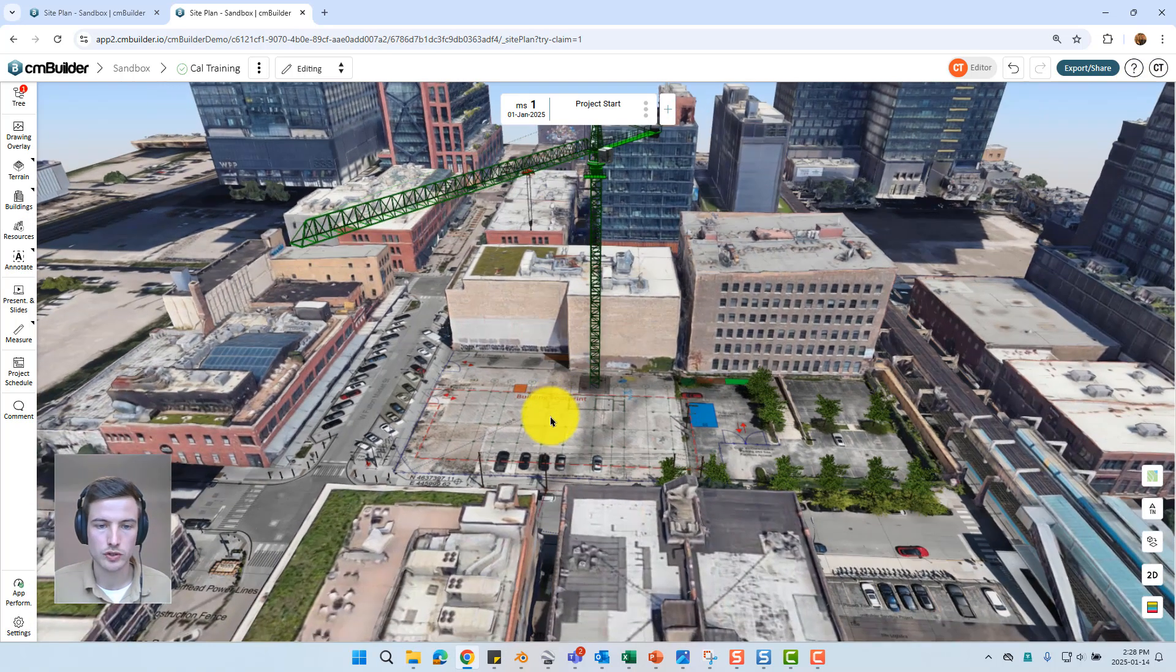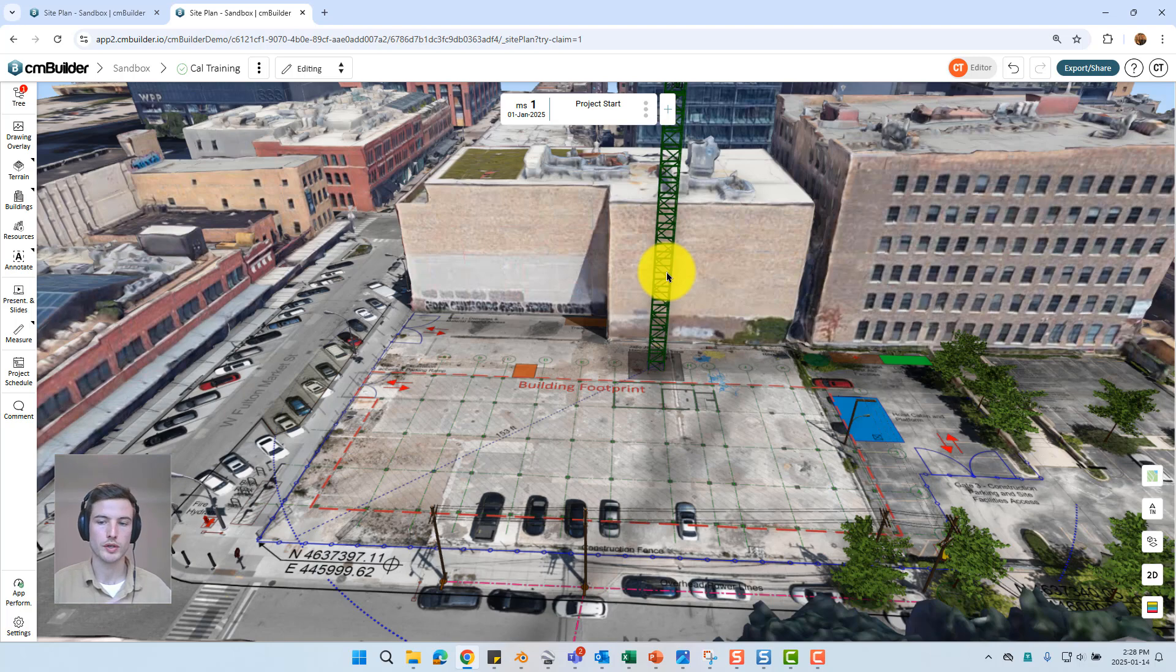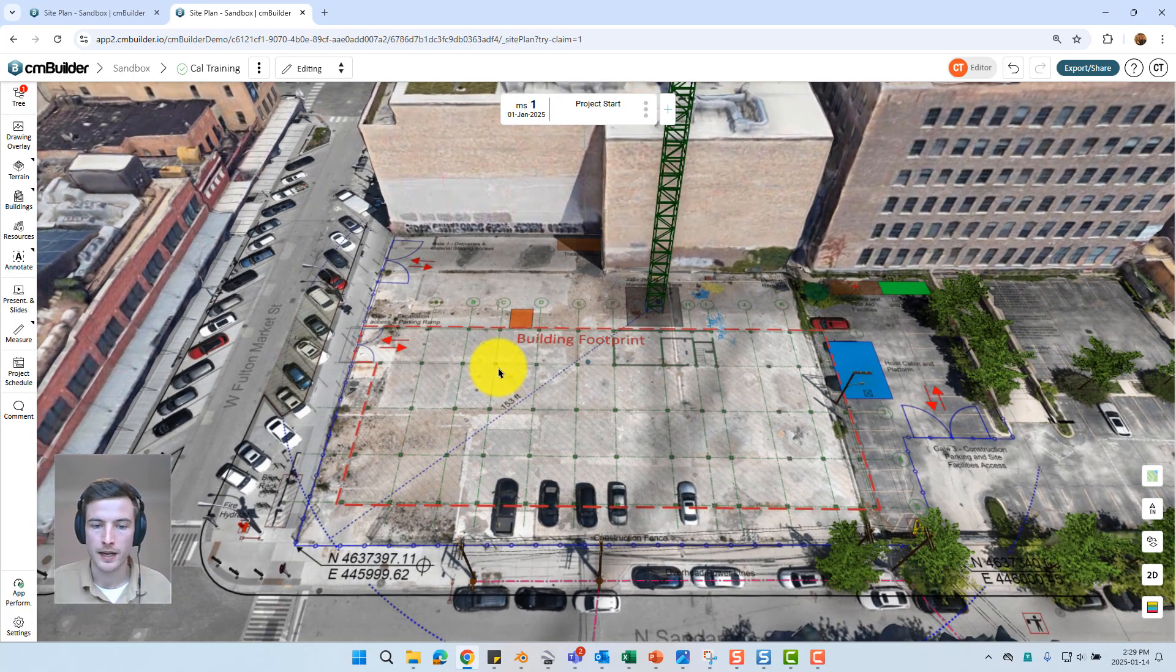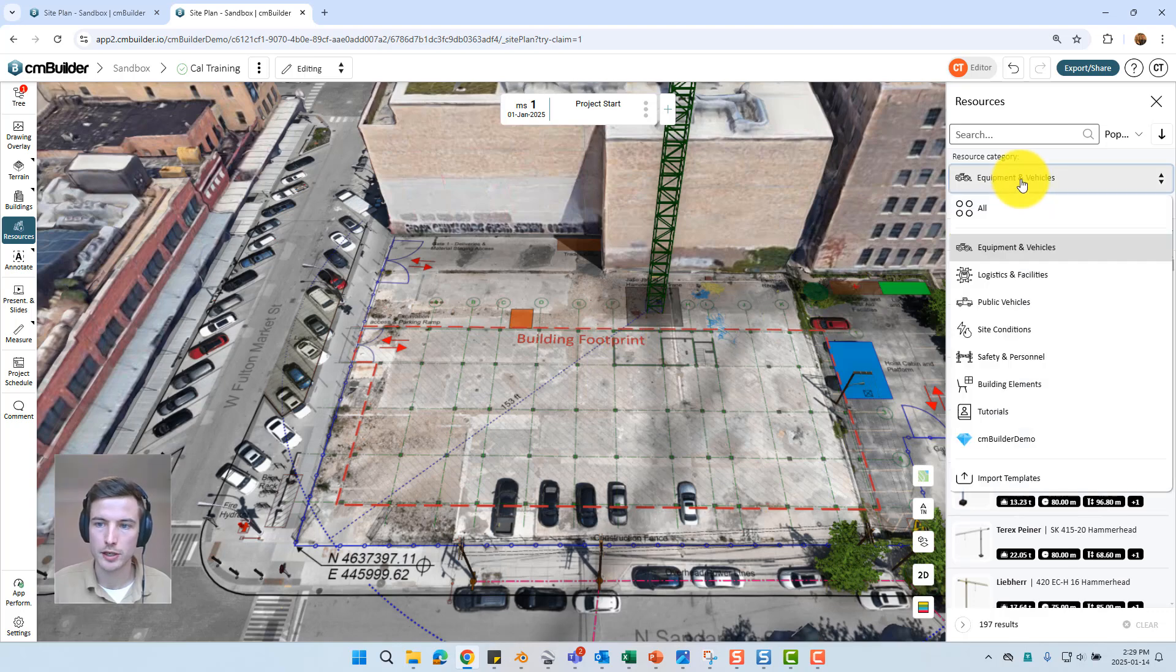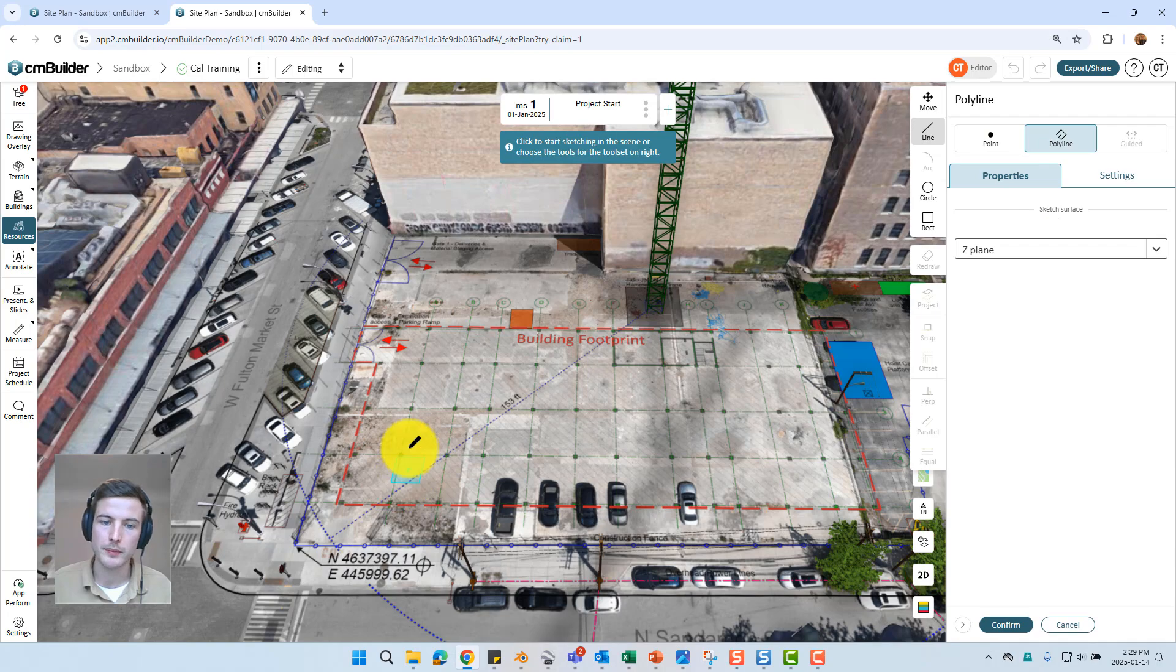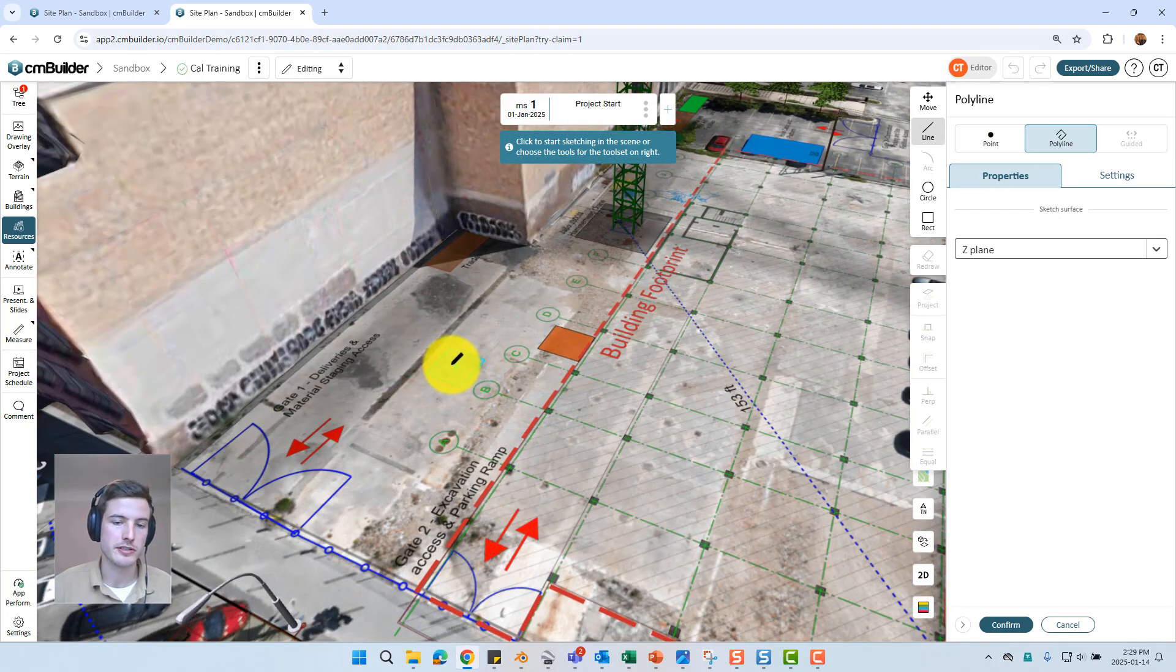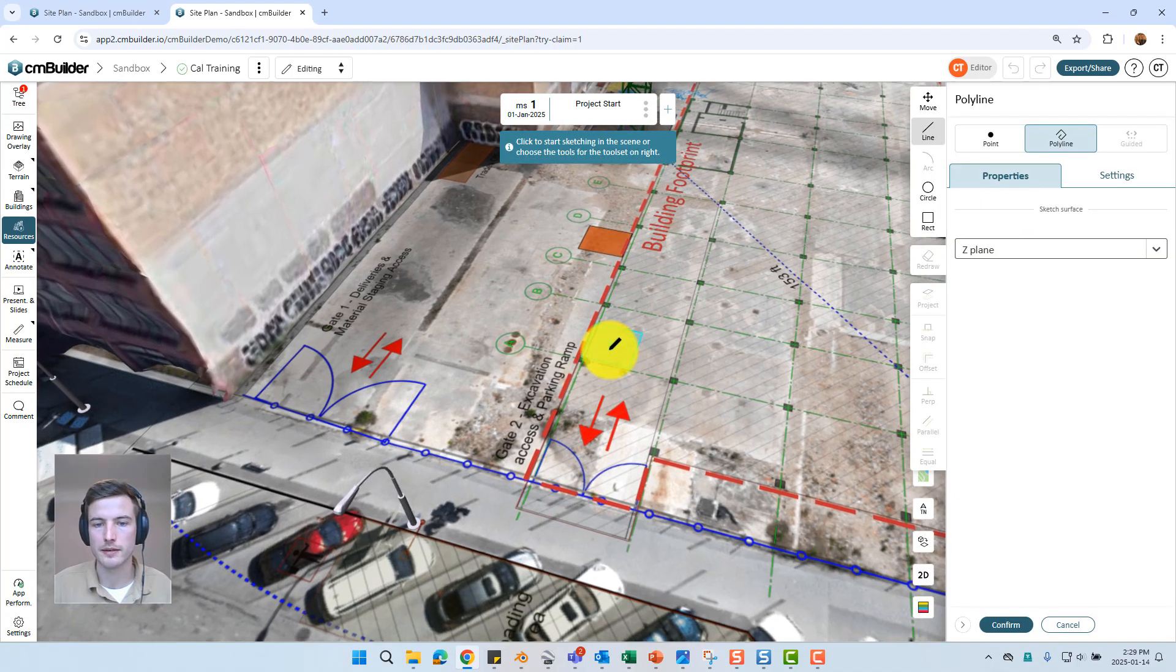The second type of resource which I'll mention is the polyline based resource. So the crane is an example of a point based resource. The majority of resources are a point based resource just click and drag. A polyline resource you're going to create a sketch and it's going to create individual copies of that resource along the entire perimeter. There's a whole bunch of different examples but the most obvious of which is the fence. So I'll just go into our resources. This time I'm going to go into our logistics and facilities category and select fences. I can then use this chain wire jersey barrier or any other style of fence. And we can see by default my cursor has turned into a pen icon and there's just a little plane indicated. Note I could place this fence as a point based resource just to place a single fence panel. However you're typically going to want to place it as a polyline.